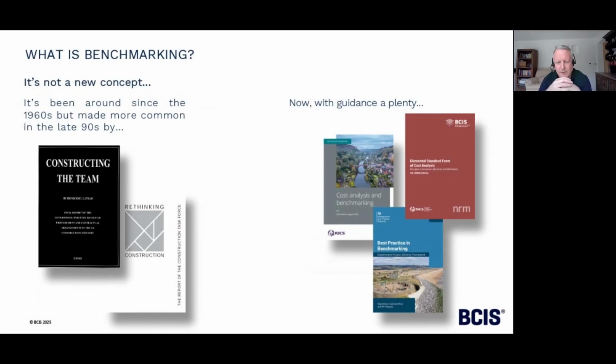Those of you that get involved in this will obviously recognise some of these titles, but the standard form of cost analysis is the thing that BCIS produces, which is a way of analysing data into a common structure, which is very, very important when it comes down to benchmarking, and we'll be talking about that a little bit later on. But the one on the left is the latest RICS guidance, which is cost analysis and benchmarking. I believe it's the 2nd edition. I think it came out last year.